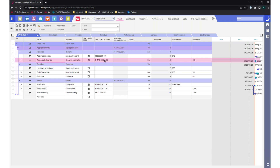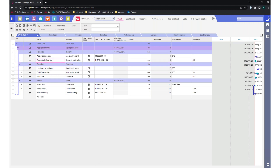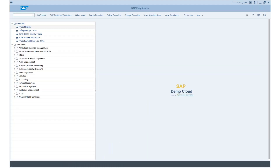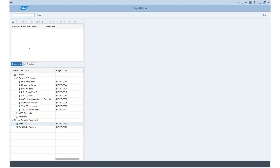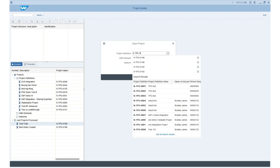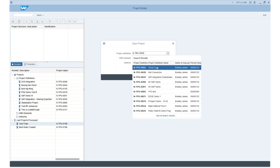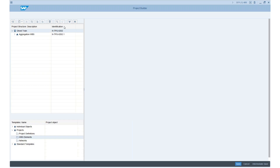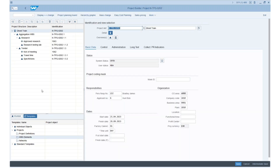We created something in SAP, so let me quickly go into SAP. Using the project builder, I'll open the project we created — it has the project number N-TPG-0202. We can see this is the Ghost Train that we are in preparation of. And we also see that only the hierarchy we wanted from Planisware is here: the research phase and the tender phase, but the execution phase is not yet there — as we intended.